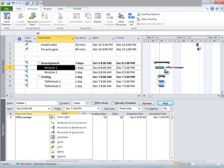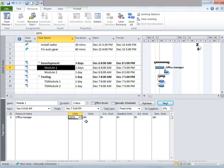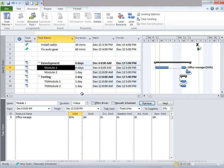I'm going to right-click on Resource Name and select Work. Let's say my Office Manager is going to be available only half of the time — not available for the full time. Under Units, there's something called 100%. I'm going to decrease it to 50%. Notice the current duration of this task is two days. Now I'm going to click OK. Once I do that, notice the duration has increased to four days — similarly here it has increased to four days — and notice how the timeline has changed.